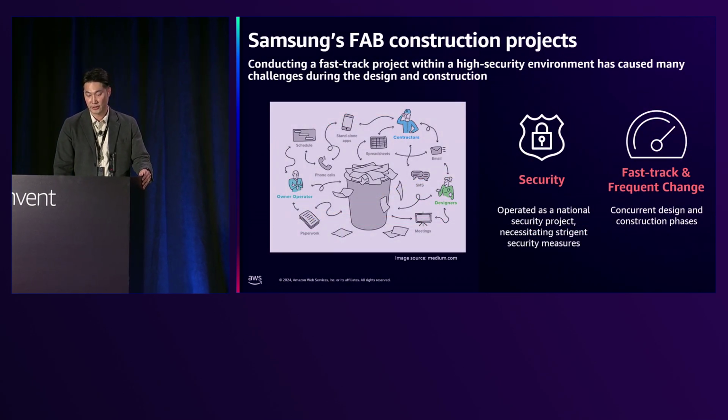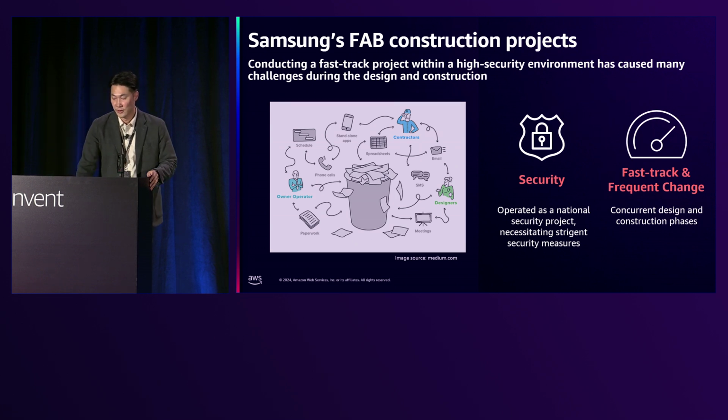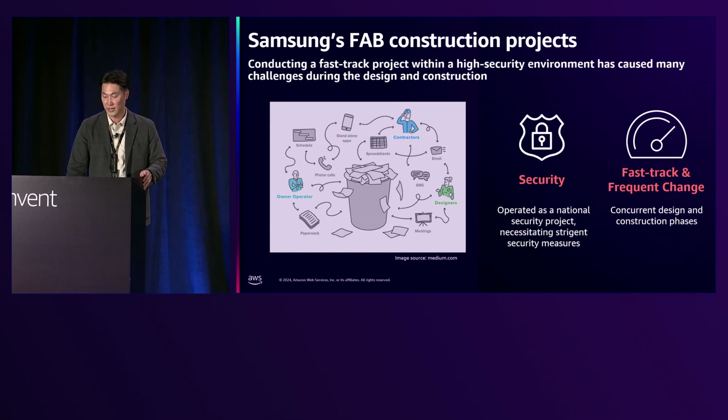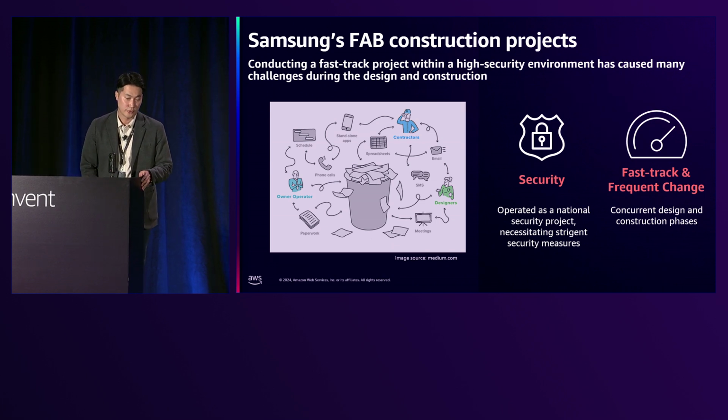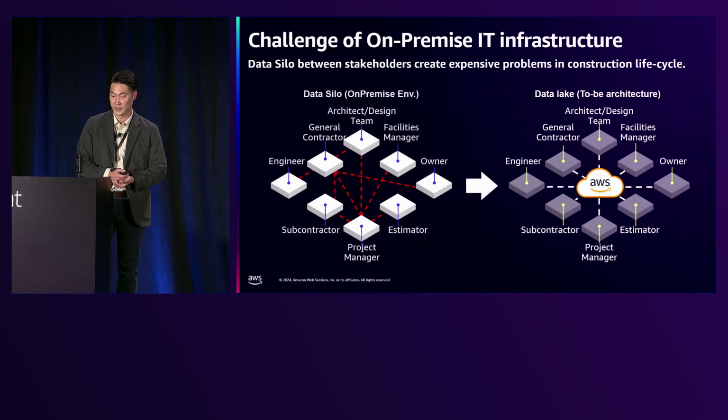The design and construction of fabs are not only complex, but doing them on a fast-track schedule in a high-security environment has created many challenges. In terms of security, fabs operate at a national security level. For the schedule, the process does not follow the typical design build method. Instead, frequent changes are needed whenever new chip technology is developed.